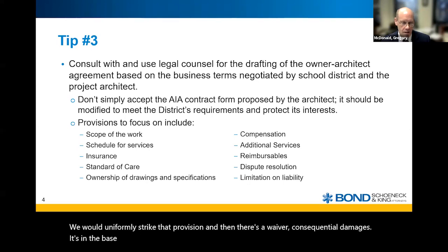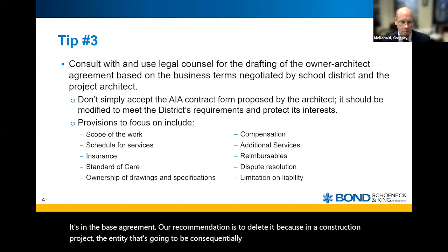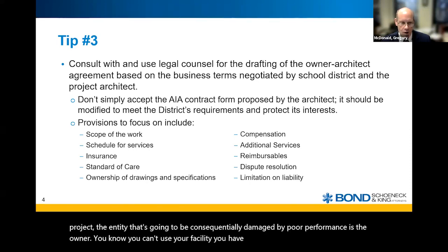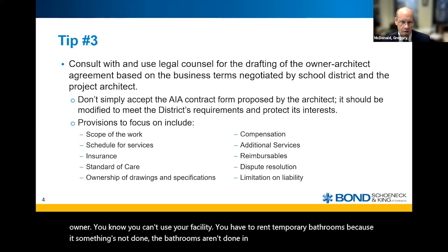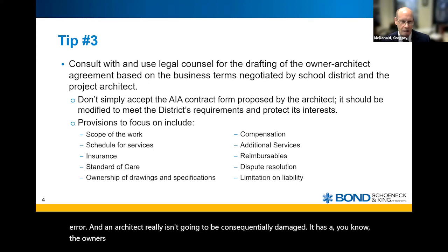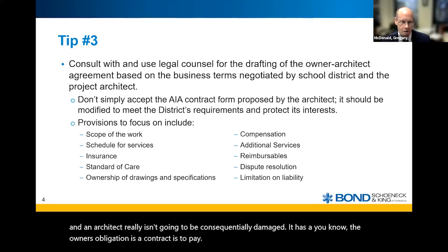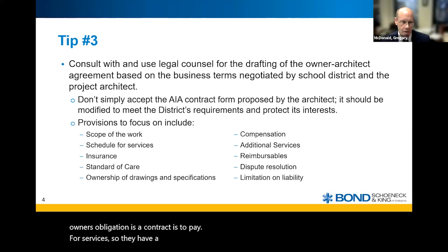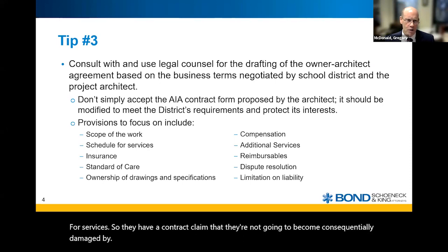Our recommendation is to delete it, because in a construction project, the entity that's going to be consequentially damaged by poor performance is the owner. You can't use your facility. You have to rent temporary bathrooms because the bathrooms aren't done in time because there was a design error. And an architect really isn't going to be consequentially damaged. The owner's obligation under the contract is to pay for services, so they have a contract claim. They're not going to become consequentially damaged by the owner's breach in that case.